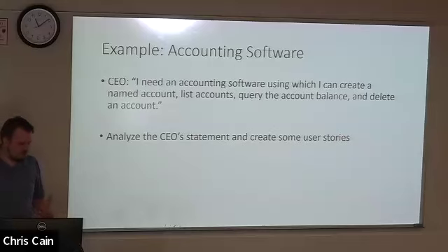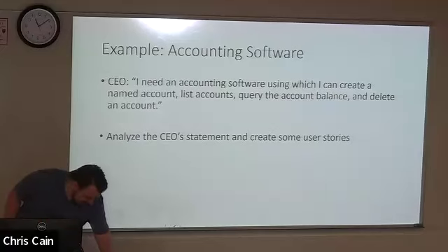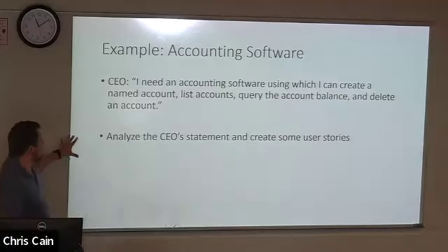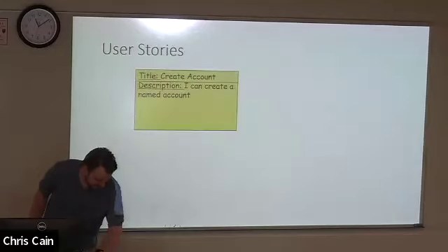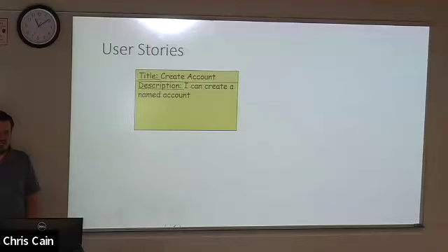And we might want to analyze this statement and figure out, okay, the client came to me with this. What are they actually asking me to do? What are the tasks that need to be done, the non-technical tasks? Let's give you an example. You can take a piece of this that says, I need to be able to create a named account. So we can write a user story about creating an account.